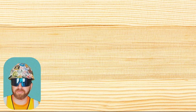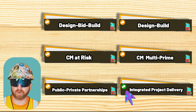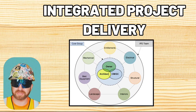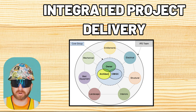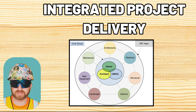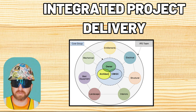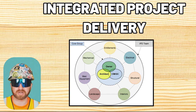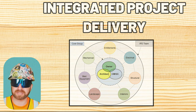Finally, the last project delivery method is Integrated Project Delivery or IPD. This is one of the newest delivery methods in the construction industry and was meant to be forward-thinking. It ties all partners and parties together under one contract, spreading all the risk and all the rewards amongst all parties equally. Everyone works together — integrated — from start to finish. It's not commonly seen in practice, but it does exist.